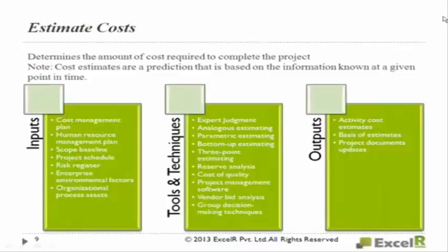Now you do an estimation of scratching the wall. How much does it cost? Then putting the white paint. What is the cost? Then putting the colored paint. What is the cost? So you will break down, and from the bottom you will go to the top. That is called bottom up. There are 2 types of approaches normally in general: a top down approach and a bottom up approach. Top down is from top you come down. Bottom up is from bottom you go up. This is called bottom up estimation.